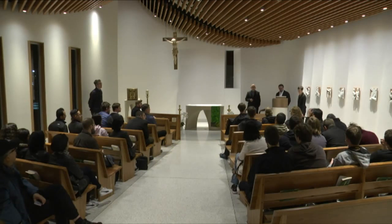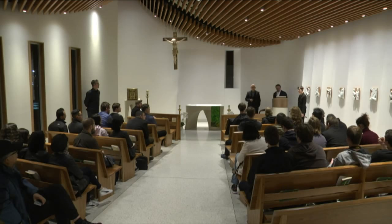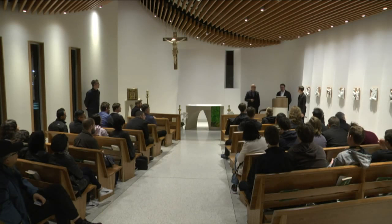So a typical design-bid-build model seems like it would not work well for what you're talking about, because you wouldn't have those conversations. Was this project done differently? It was construction manager running it. They had pre-construction services as part of their contract, so working with us all the way through, they were compensated, and they were bringing the trades to us. Sometimes we were sneaking around them to get to the trades in a couple of places, but for the most part, it might have been very different as a traditional bid-build. Yeah, the danger in that delivery system is you don't know what the cost is until you're way down the rabbit hole with the design.